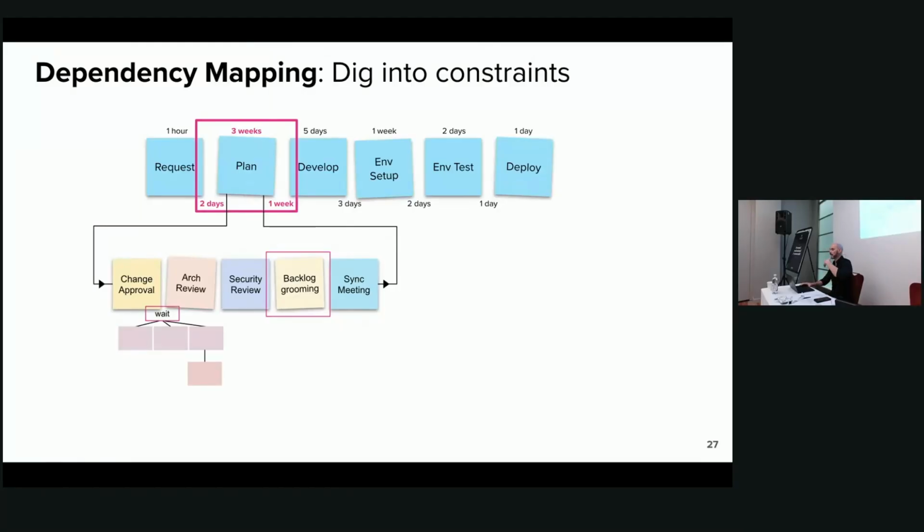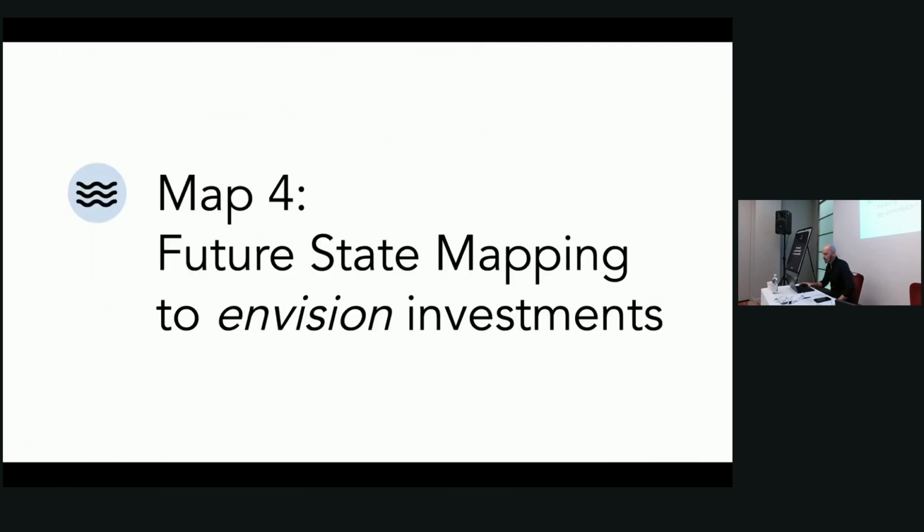We do a 5 whys exercise and just ask why until we're exhausted. That's not how it goes, but you dig deeper and deeper into what might be causing this. But we can also just look at causal factors. What are the things that are influencing this area of challenge? So that all feeds into our future state, which is essentially where we start to get into the solution space.